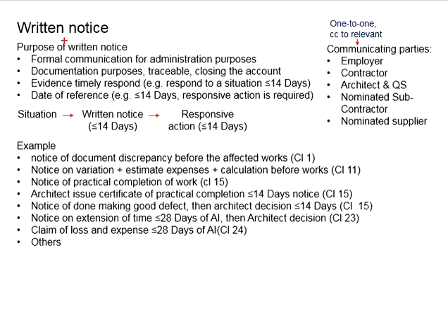And often, this written notice also provides the dates of reference. For example, for certain cases, there is a limit in terms of the durations for the responsive actions. Based on the date of reference, if the relevant action is not taken, it is deemed not entertained. This shall trigger the following course of actions. It is not just some notice being sent here and there.